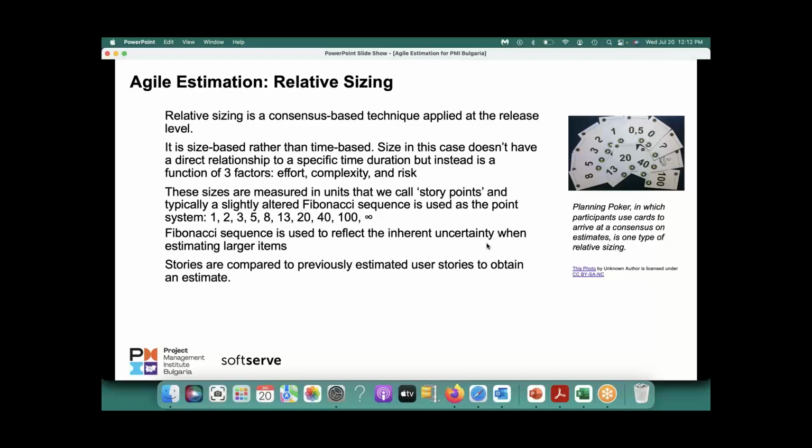So if I can finish it in 2 days, start to finish everything, then I'll say up to 2 days, not 2 days. I can finish it in 2 hours. I can finish it in half a day. I can finish it in 1.5 days. Everything is one story point. Okay, up to 2 days, one story point. And then you can extrapolate. You can have the sizing done in a similar way. If something is 2 story points, it may take 2 to 4 days. If it is 3 story points, it may take 5 to 6 days. If it is 5, it may take 6 to 10 days, right? Something like that.